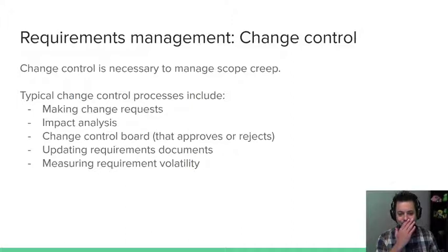But this is basically just something to watch out for, because you start investigating new technologies and new features and you think, oh, we can do a 5 minute, let's look at this thing. And then 3 hours later, you're still trying to bring that into your framework, right? So just be aware that there are ways to manage scope creep. Having your requirements be locked down is one of them. If your requirements are locked and you have a rigorous process to go through, it's hard to add these little bits and pieces that balloon a project's time and budget.